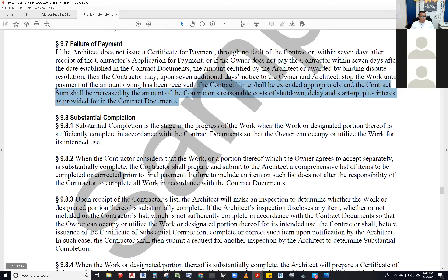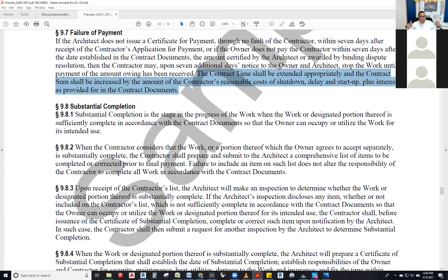Section 9.8: substantial completion. This is a big one. Before I jump into it — does anybody know what substantial completion is? It's when the work is at the stage where the owner can use it for its intended purpose. Exactly. So a faucet is supposed to provide hot and cold water — it provides hot and cold water and closes properly.